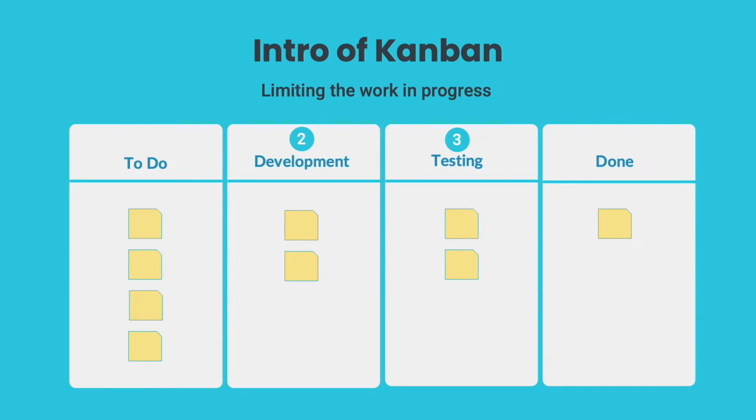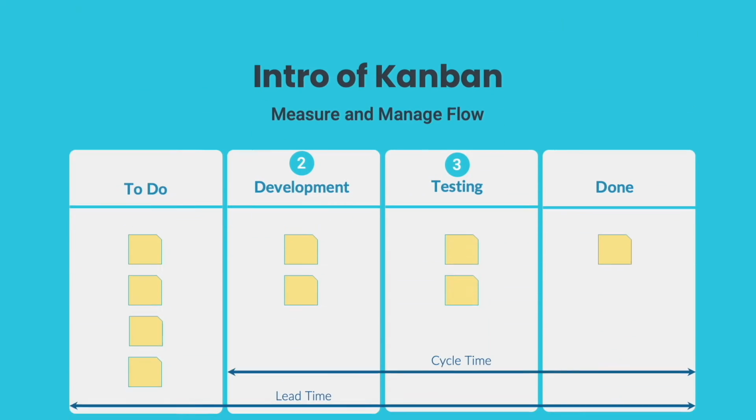Kanban prioritizes flow of work. In order to accomplish this, we set limits to how many work items can be in progress at a time. It doesn't benefit anyone to have lots of work in progress, but not to accomplish anything at the end of the day. In knowledge work, the issue of context switching can reduce the effectiveness of workers.